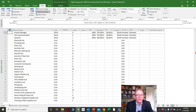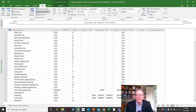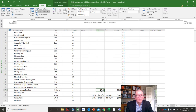You'd have subcontractors listed as a cost resource based on a subcontractor rate, depending on how you want to manage it. There's even a material resource type that we'll talk about when we cover resources.